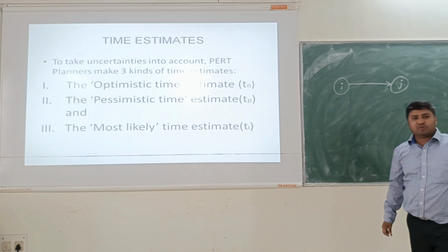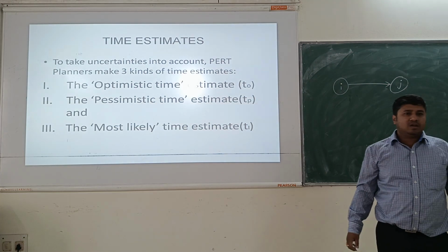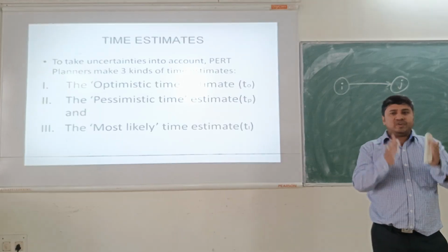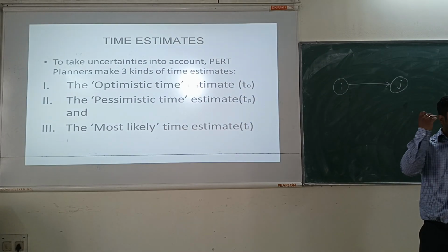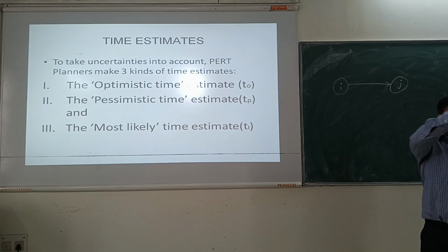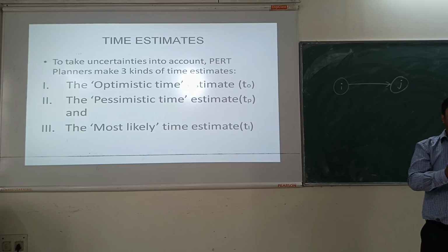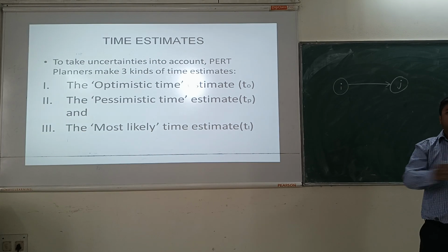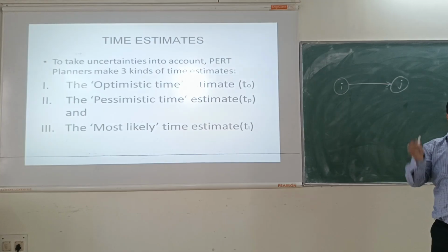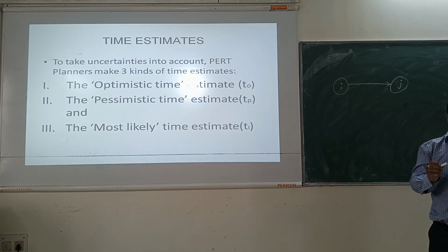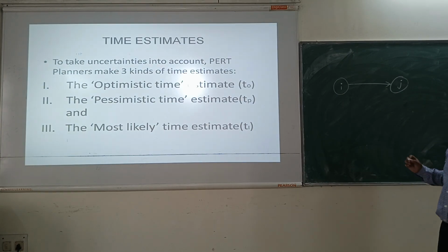In a frequency distribution, which is probabilistic, the area under the curve which we consider, and the ratio of the partial area that is covered divided by the total area, will give me the probability, the frequency of occurrence, or the chance of completion of a project being fulfilled.